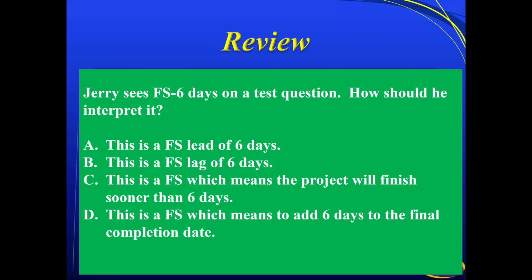And then this will be a little test for you guys who are doing the PMP. They'll throw you off sometimes. Jeffrey sees an FS minus 6 days on a test. How should he interpret it? This is a finish to start lead of 6 days, lag of 6 days. This is an FS, which means the project will finish sooner than 6 days. This is an FS, which means to add 6 days to the final completion day. What does that really mean? Well, the right answer, this is a lead of 6 days.